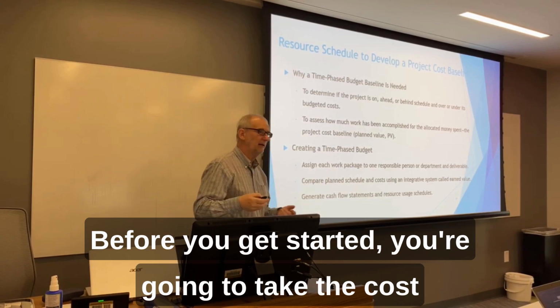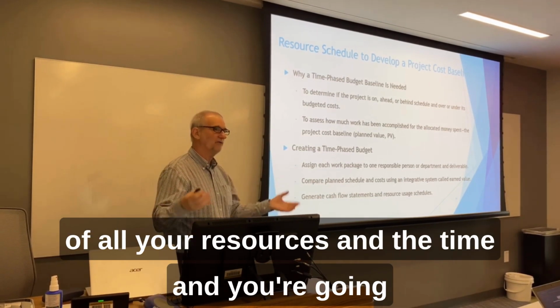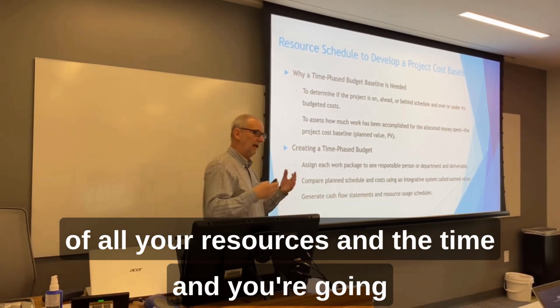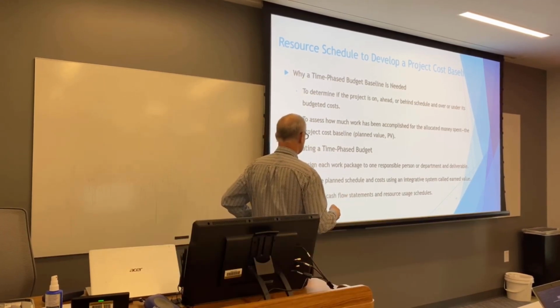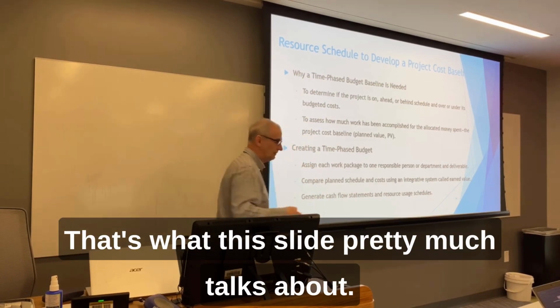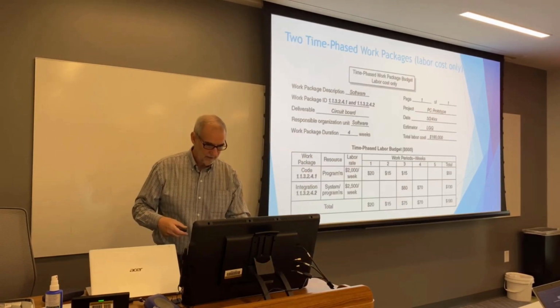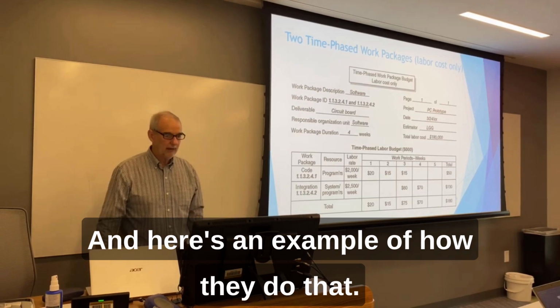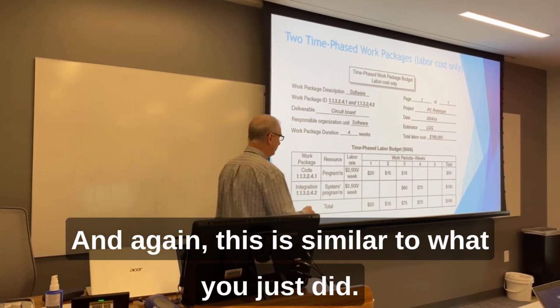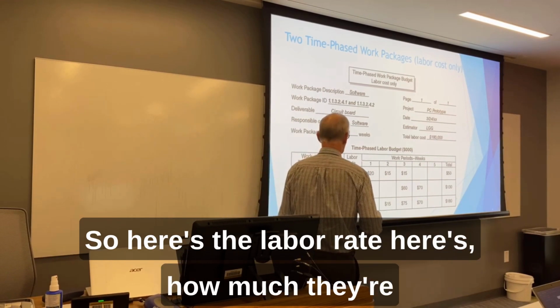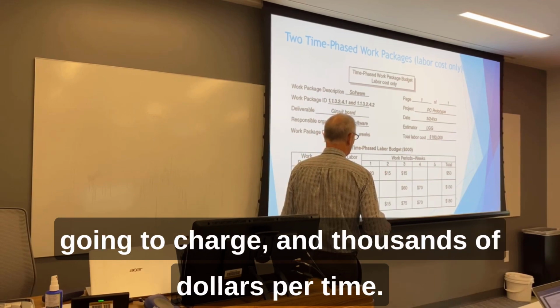But that's what we're talking about here. Before you get started, you're going to take the cost of all your resources and the time, and you're going to then come up with a budget, okay, baseline budget. That's what this slide pretty much talks about. And here's an example of how they do that. And again, this is similar to what you just did. So here's the labor rate. Here's how much they're going to charge in thousands of dollars per time.